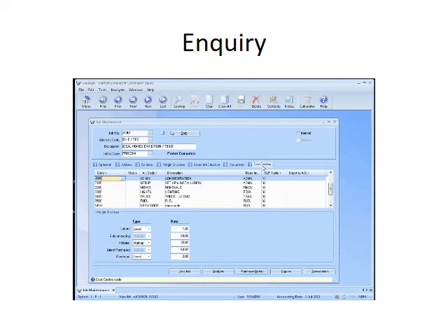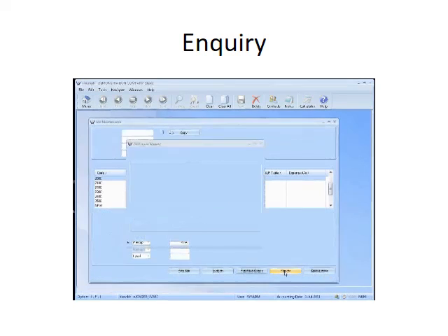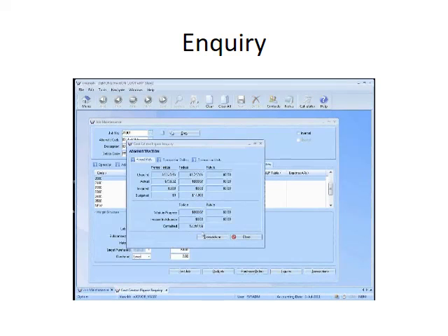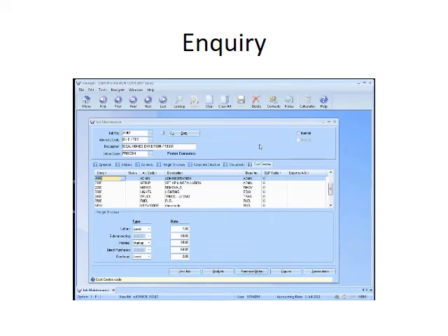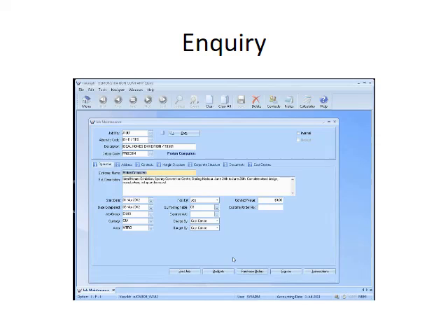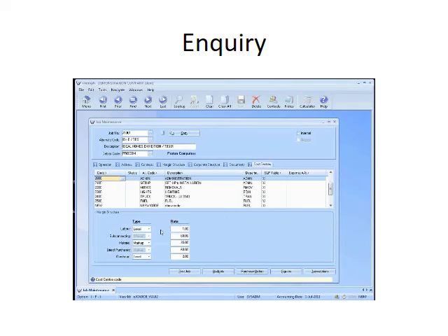So back onto the cost centre. When I look up that cost centre, same sort of information, work in progress, committed. It'll also only give me the transactions, so same amount of information, but only for that cost centre that I'm working on. So the key component there is to be aware that if I look at operations, it gives me any inquiry information for the whole job. If I go into the cost centre, I can see the details for just that section of the job.